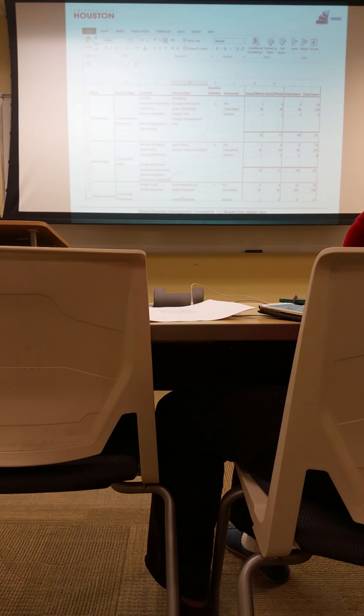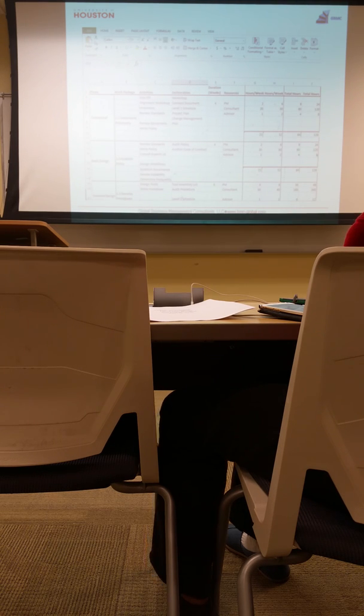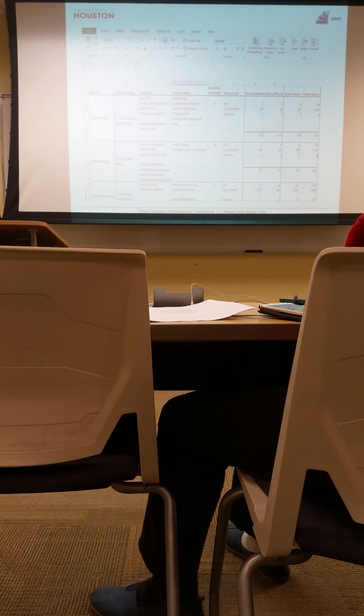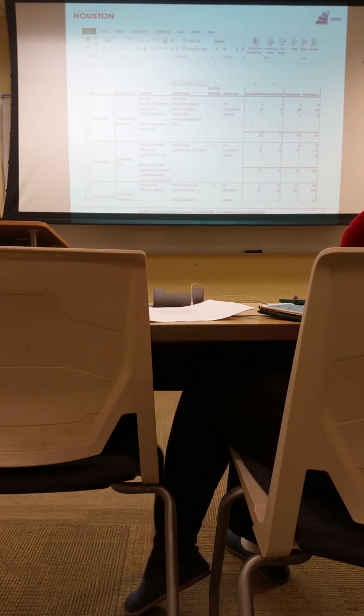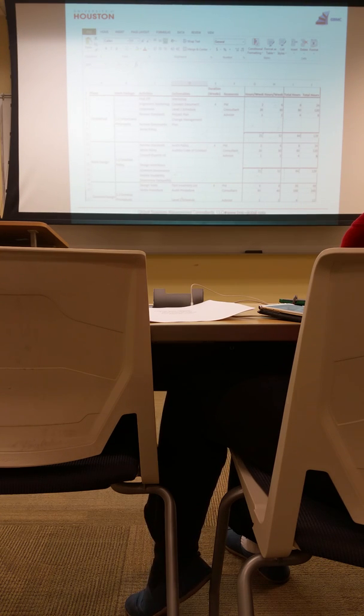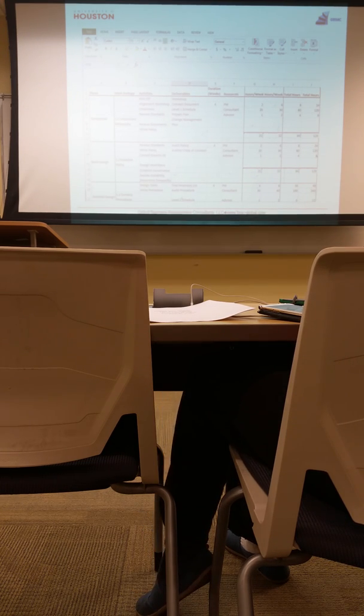So your next step is to do exactly the same thing. Extract from your WBS dictionary, and maybe even add to it a little bit more. Strictly speaking, activities and tasks are not part of the WBS dictionary. There's a next level in the scheduling. Extend that WBS dictionary that you turned in today into the task and activity level, and begin to think about how long each one of those tasks are going to take. And develop an estimate around each one of those.